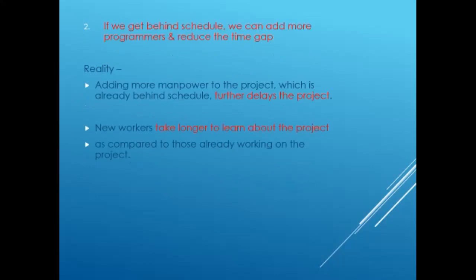Myth number 2: if we get behind schedule, we can add more programmers and reduce the time gap. But the reality is that adding more manpower to a project which is already behind schedule further delays the project.